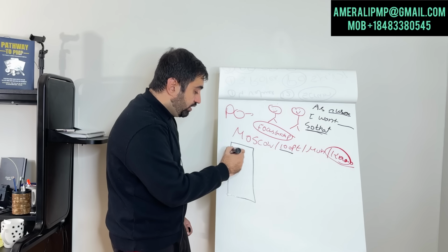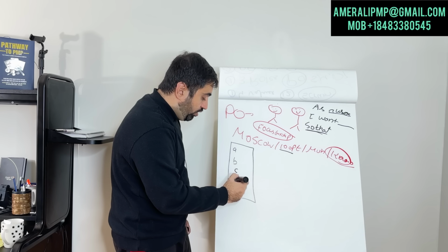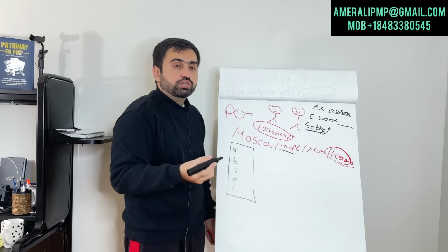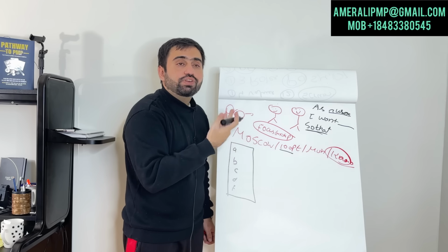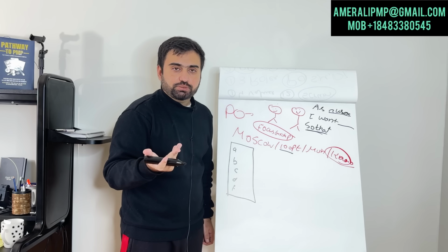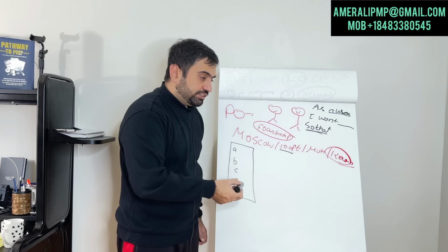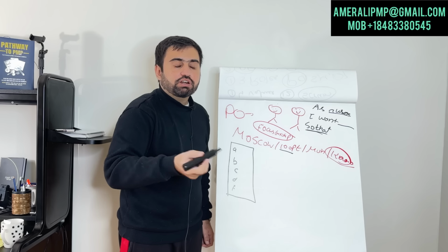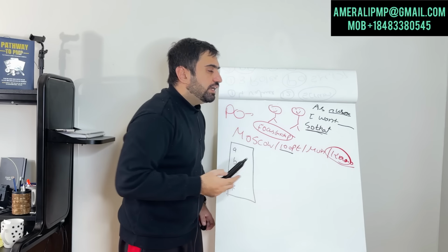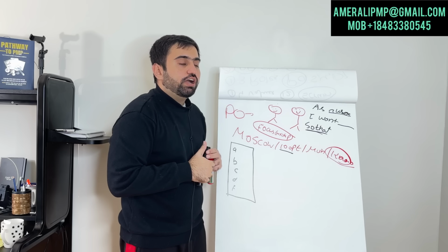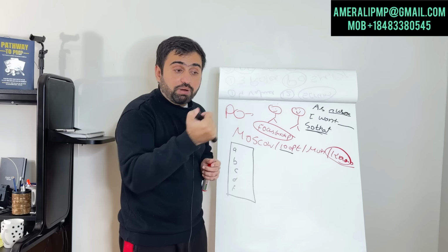You can put all the points on one user story, or you can divide it in any way. Once they have given the points, we will add them up, and whatever is most valuable becomes the most important requirement. The Kano model is basically where we prioritize the requirements according to market value.